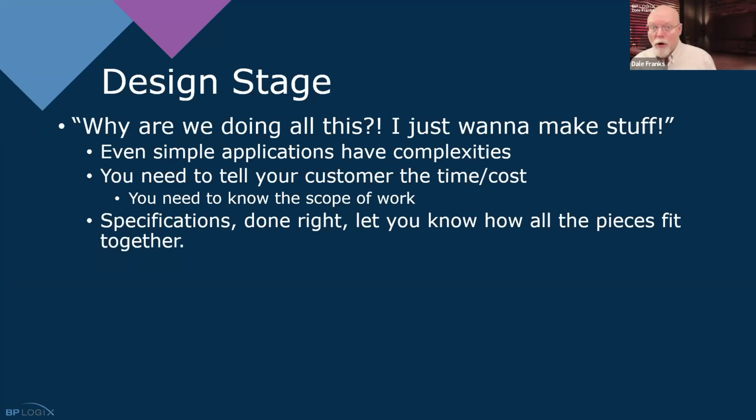There are some organizations who actually do internal accounting on this. Yours might be one of them, where the time that is spent on building this application has to be paid for by the requester's organization. In that case, they want to know more than just about the time it's going to take you to build. They want to know the cost, because they're going to get charged an internal cost for every hour that you spent working on this project.